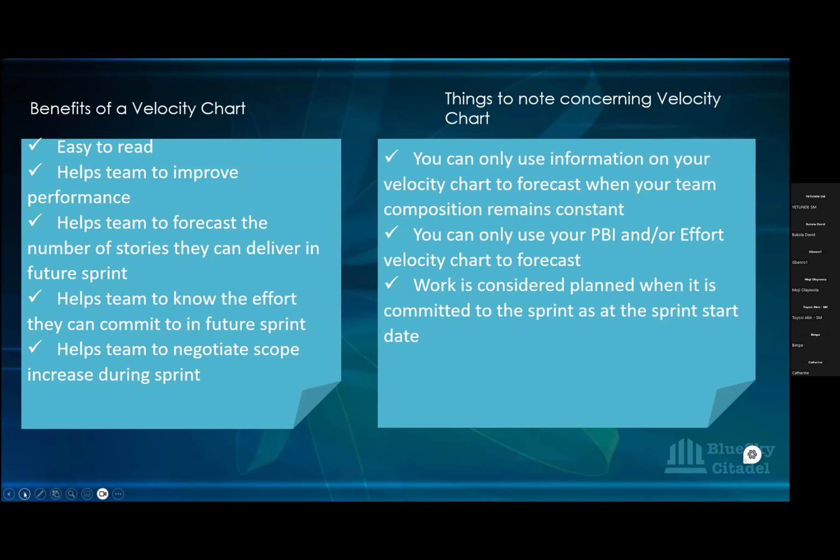But why it is not advisable to story point your task is because tasks have different weights, if I can put it that way. When you have a task that says just put a button there, and you have another one that says put a button there, let that button link to another page and use a hyperlink, that is getting complex now.